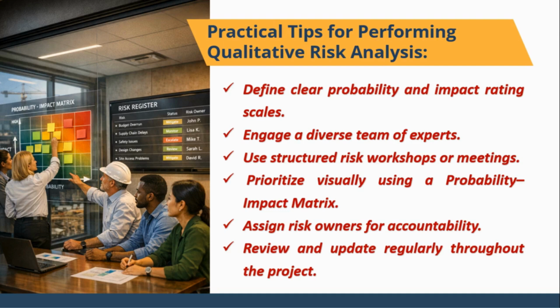Another critical practice is to assign risk owners for accountability. Each high-priority risk should have a named individual responsible for monitoring the risk and implementing response actions. Without clear ownership, risks are often ignored or addressed too late.